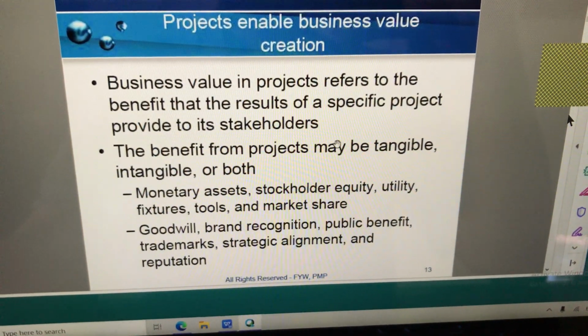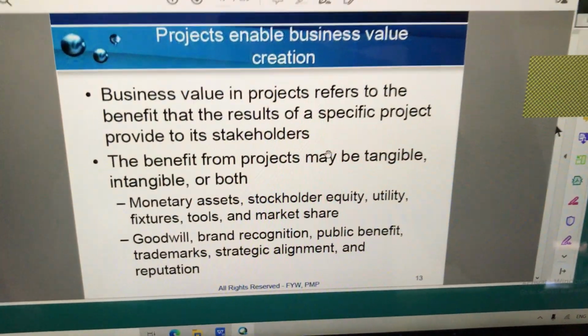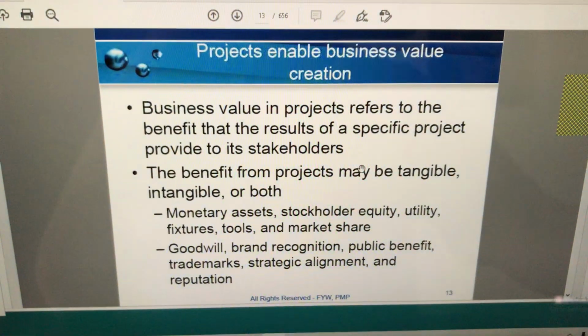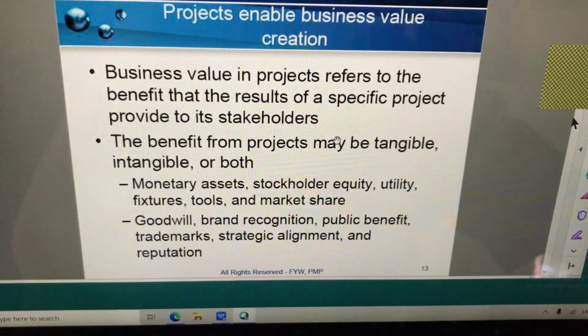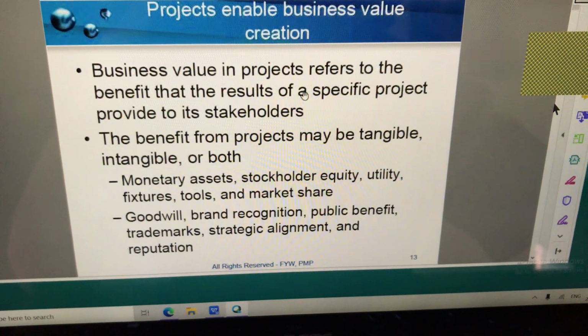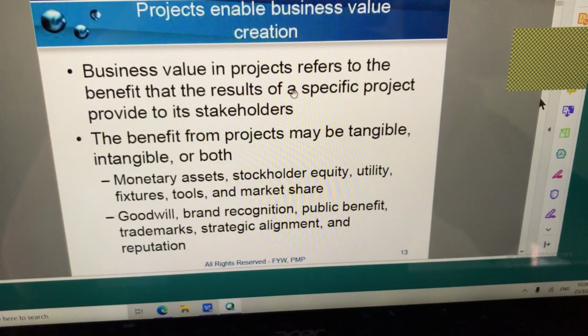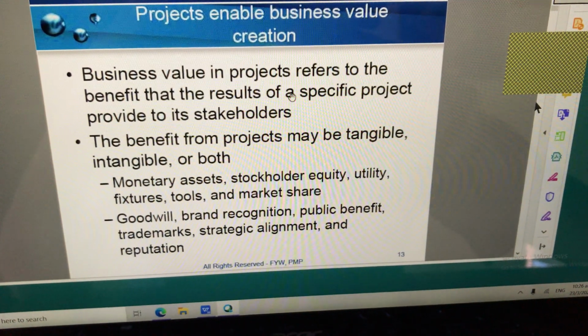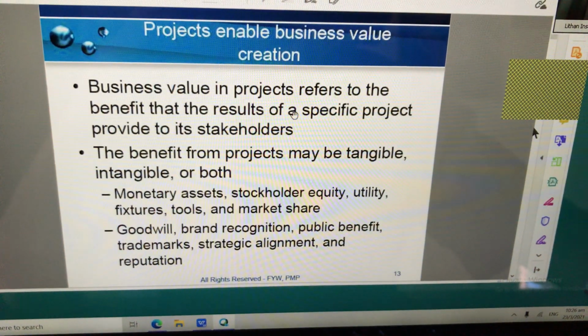All that maintenance cost will also be netted off. So they will look at net present value. That's called net present value. And net present value has to be higher. It has to be definitely more than the investment cost. This is what business value creation is. So if you understand what business value creation is, wherever you hear of some project, you should be able to ask the question, what will be the value creation from this project?